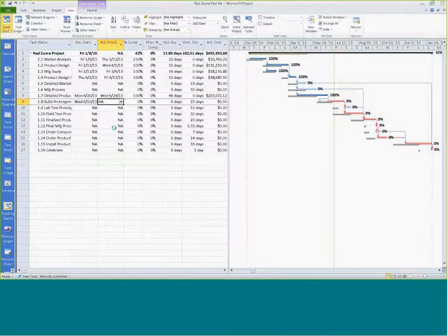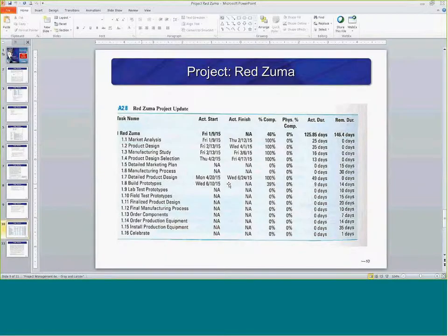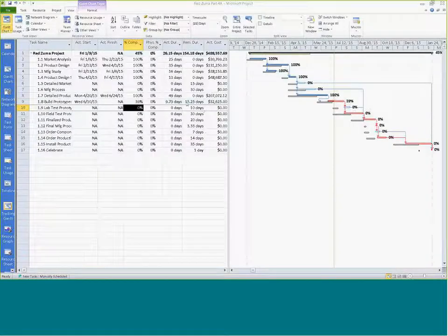And we're currently at 39%, and we can put 39, hit enter, and it says 9 days for actual remaining. It says 14, but ours is slightly different. It says 5.2, but that's because we didn't start when we were supposed to.